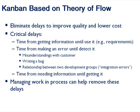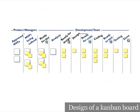Kanban is based on this theory of flow — the idea of eliminating delays to improve quality and lower cost. Critical delays include: time from getting information — in a waterfall environment, if everything is planned up front and worked on at once, you have really big batches. If it takes a year from getting information until you use it, that information degrades. If I'm working on five projects at once and testing is delayed, I'll take longer to tell the developer about an error. So we want to manage work in progress to help remove these delays.